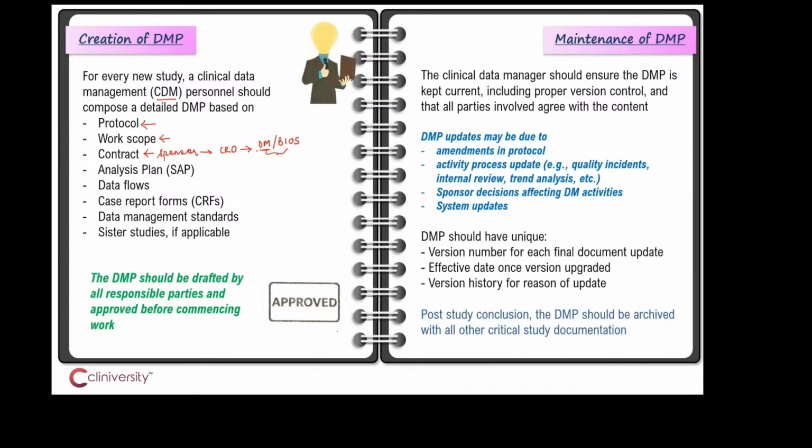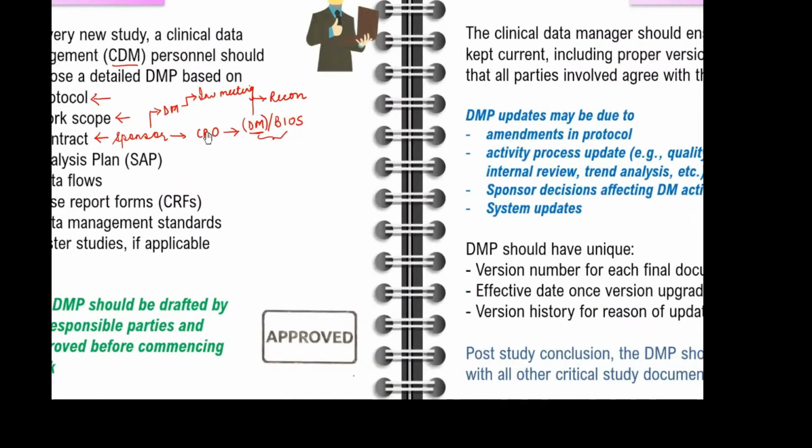Likewise, now let's understand work scope within DM. Within DM itself, it's not necessary that the CRO will do everything end to end. It may happen that the CRO data manager would do most of the reconciliation activities, but the sponsor data manager may do the rest of the activities, which is basically attending the investigator meeting and presenting the data management side.